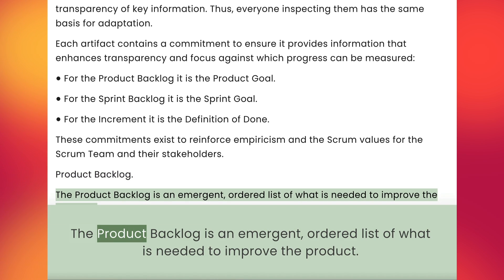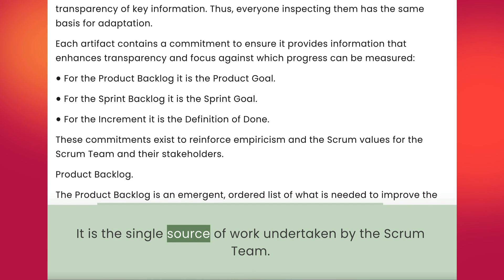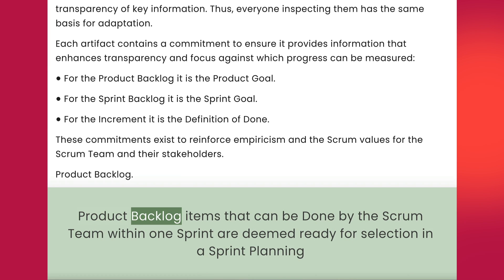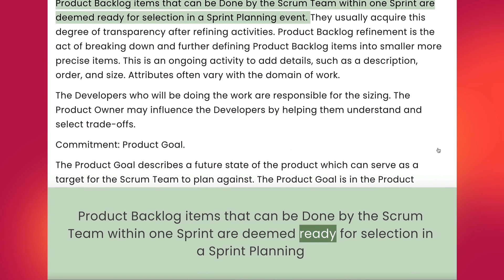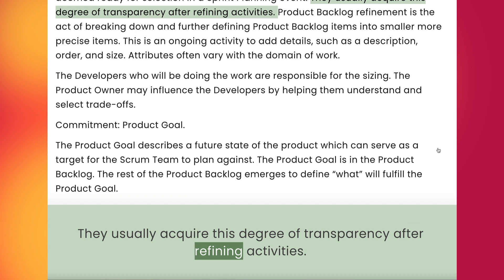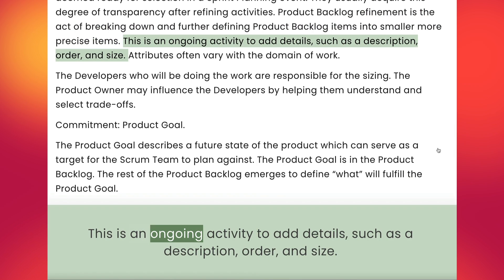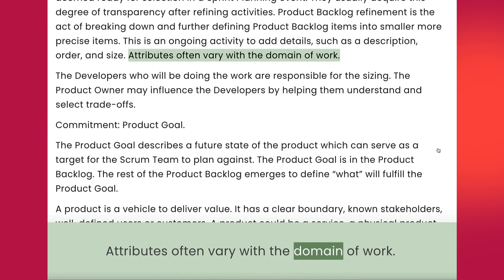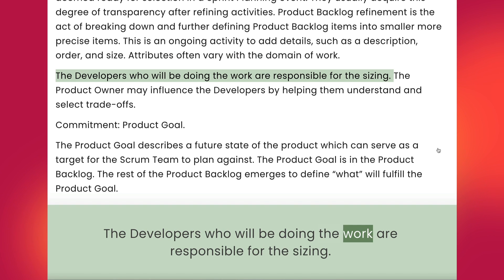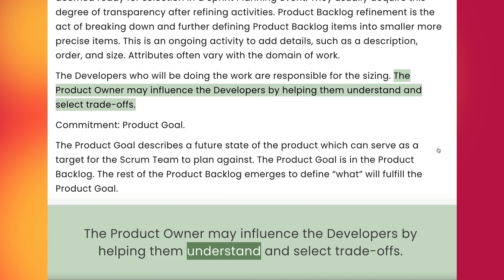Product Backlog. The product backlog is an emergent, ordered list of what is needed to improve the product. It is the single source of work undertaken by the Scrum team. Product backlog items that can be done by the Scrum team within one sprint are deemed ready for selection in a sprint planning event. They usually acquire this degree of transparency after refining activities. Product backlog refinement is the act of breaking down and further defining product backlog items into smaller, more precise items. This is an ongoing activity to add details such as description, order, and size. Attributes often vary with the domain of work. The developers who will be doing the work are responsible for the sizing. The product owner may influence the developers by helping them understand and select trade-offs.